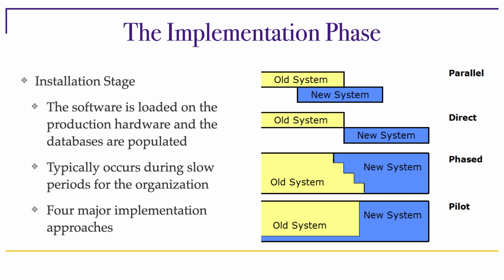This is typical for large software programs like an ERP that is modular, has multiple different elements that are interrelated but somewhat independent. For example, an ERP will have a financial module, an order inventory module, and a production module to run the factory. And so when the system is built this way, the phased approach becomes viable. And of course, it reduces the risk associated with a direct cutover, the previous example.